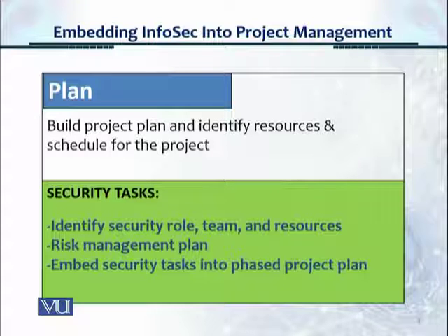And the security tasks that are done now that we've gone into the planning phase: we identify the security role. What type of security role is required? We will identify the security team and its structure, and the allocation of the resources that will be required. What type of resources will be required? How will we acquire those resources?